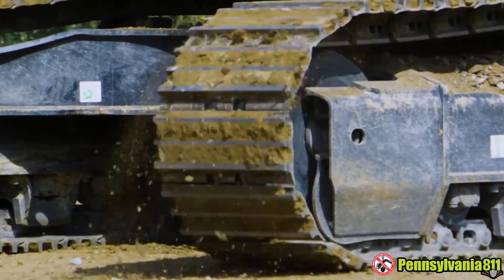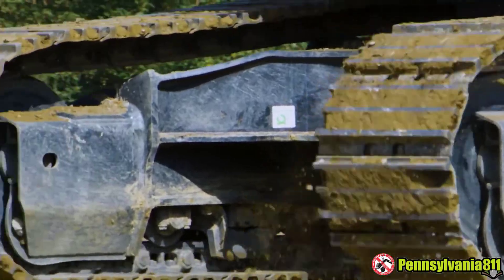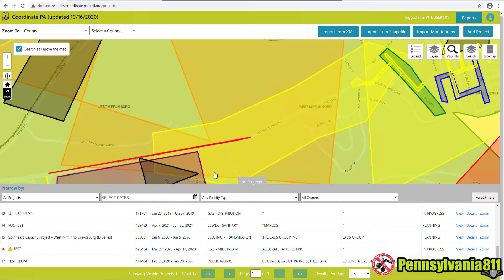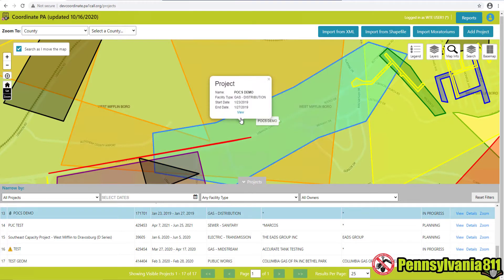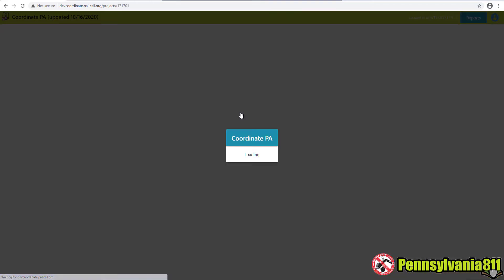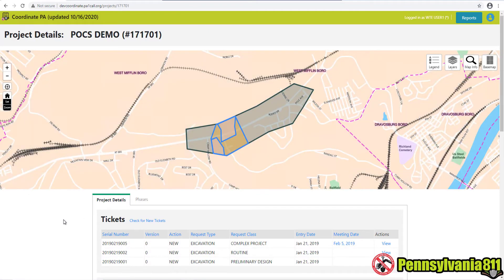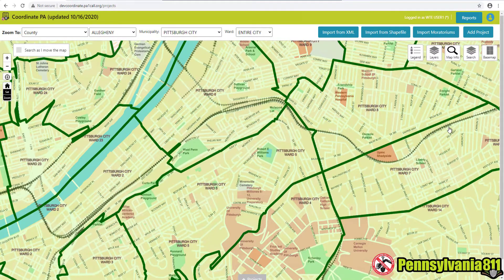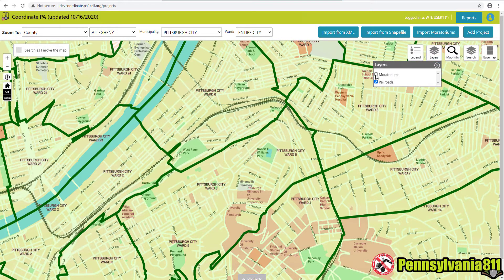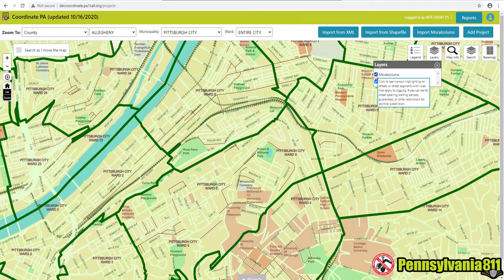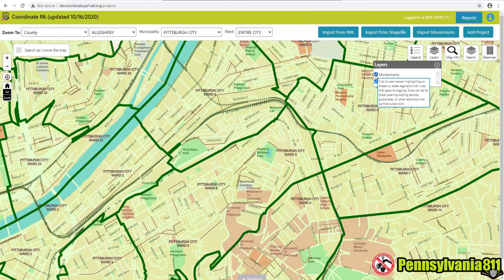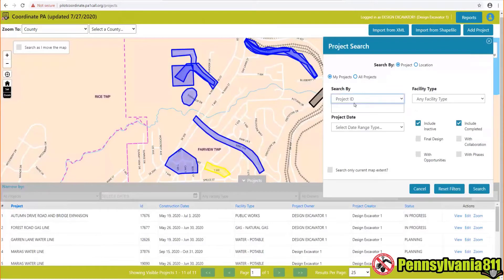What are you doing with Coordinate PA, local municipality? Well, Coordinate PA told me about a new water main project coming through my town. By working with the local utility and sharing the cost to open the road, we're able to pave twice as many blocks next year with the same budget. I also use Coordinate PA to enter my paving moratoriums. That way, if an excavator wants to do work along our annual parade route, or those two miles of Elm Street we just repaved, they'll know to reach out to us while planning any work in those areas.